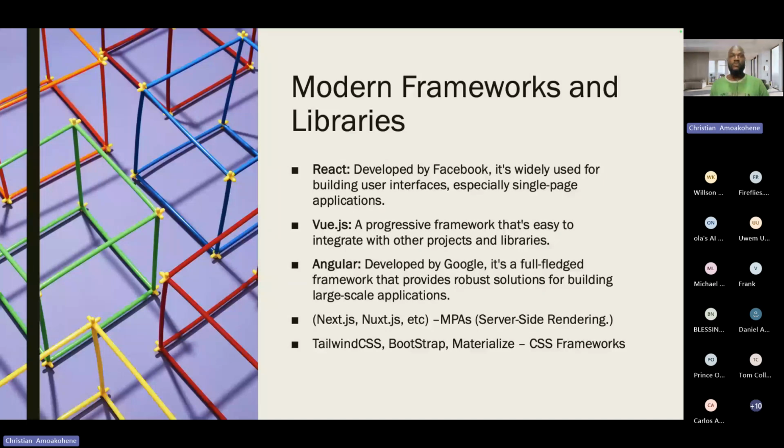If you know the learning curves associated with the frameworks as a PM, and maybe you have a team composed of fairly new developers, and there are some senior developers in there, but not as many as the new developers, what do you do? You have to pick a framework that is easier to learn, so you can deliver value faster, because Agile is all about delivering value.